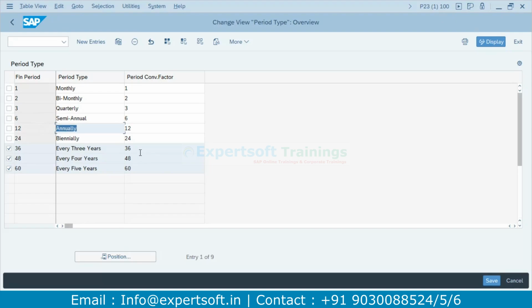So annually means I'm doing the planning once in a year. Yes, on a yearly basis: 2024, 2025, 2026, like that. At bucket level we usually prefer the annual basis, not monthly. But for initiatives or item level, it will always be monthly. The standard recipe also guides the same thing. If you want to do it monthly, you can do that.